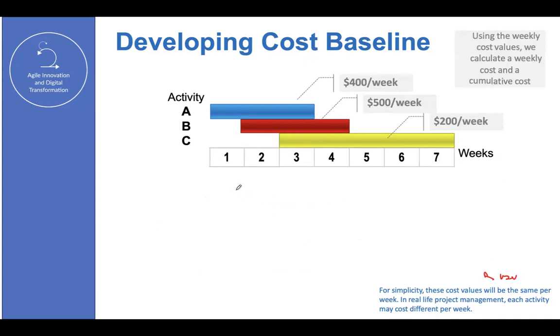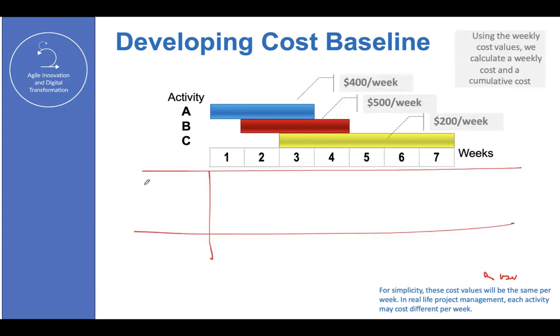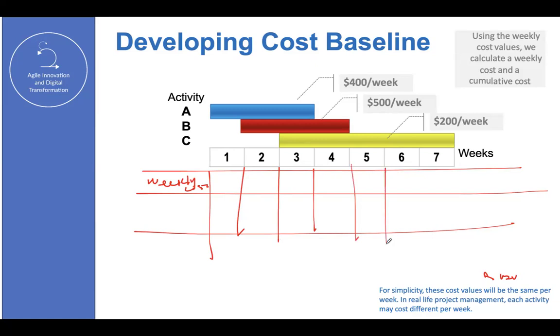And the baseline, the only way to calculate the baseline is accumulating the weekly cost. So this is the exercise that I want you to help me do. We are going to put here the weekly cost. This is very, very straightforward, very easy. We're going to calculate and just aggregate the numbers. That's it. Cumulative cost here, cumulative cost.